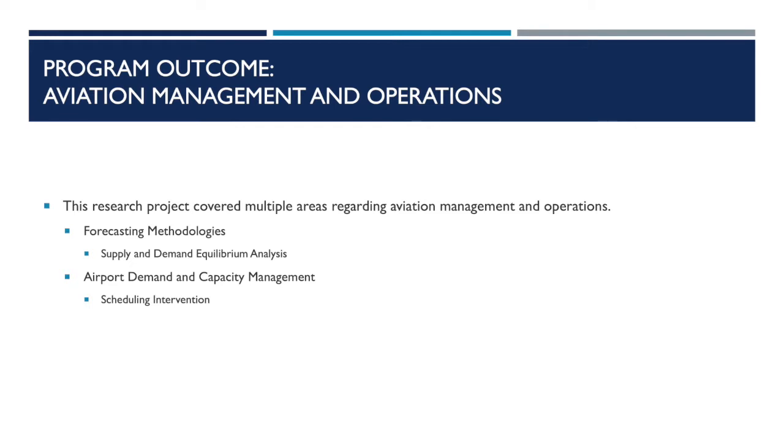Supply-demand equilibrium analysis also helps in determining the appropriate capacity levels at an airport. These types of analyses offer a unique opportunity to model the equilibrium capacity of an airport and examine the effects of increasing or decreasing operational capacity. Equilibrium analysis provides a more accurate estimate of the benefits gained through capital investment. This is important because limited funding opportunities require that capacity improvement projects yield a positive return on investment, typically in the form of reduced flight delays and reduced congestion.